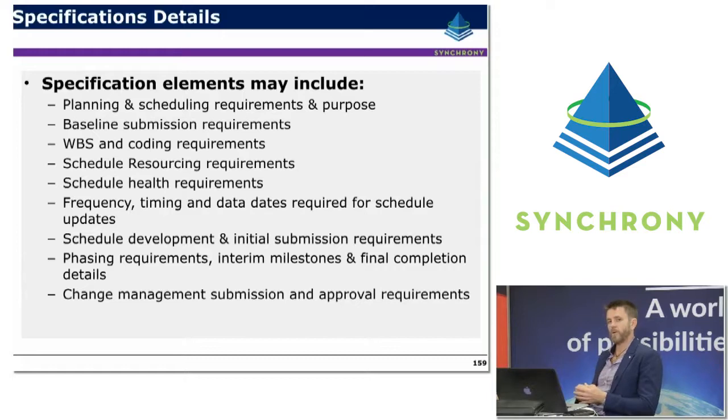So earned value reporting really requires really good timing and sequencing of the inputs, both the progress from schedules and the actual costs and accruals that come through from the finance process, so that you've got an apples and apples comparison of progress versus actual costs, progress versus planned, that's automatically getting produced with each progress report.